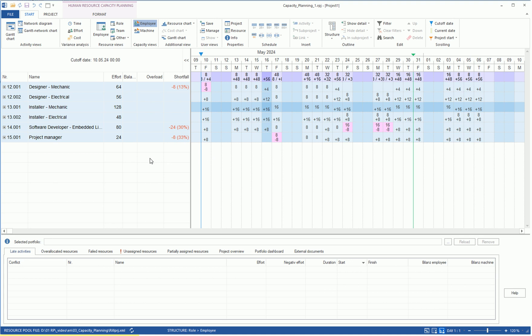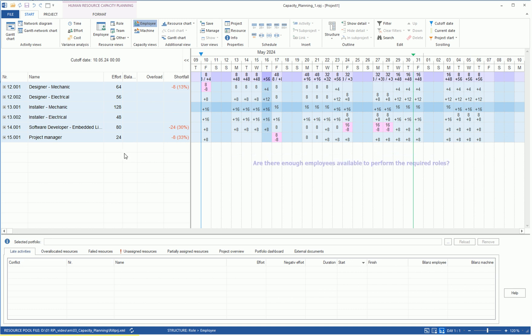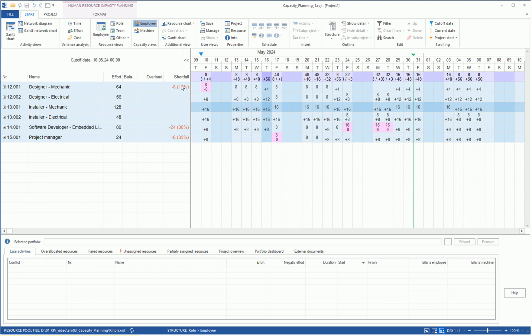This view gives us a quick overview of covering the personnel needs in the project and shows a potential surplus or shortage of personnel resources. Here, it's about matching the calculated resource demand in professional roles with the actual situation. So, with the resource supply and getting answers to the following questions. Are there enough employees available who can take on the desired roles? And how are they available in terms of time? In the event of a shortfall for a needed role, it is displayed in the diagram in red color and with the indication of the missing number per unit as a negative amount.